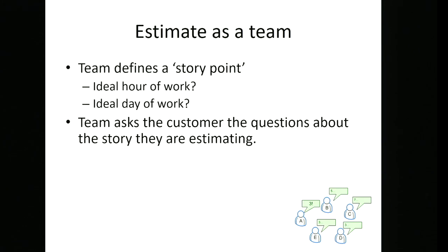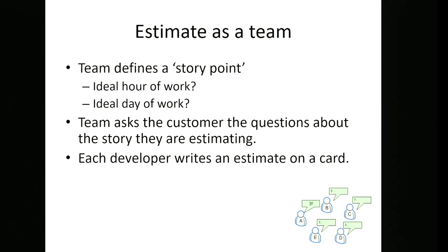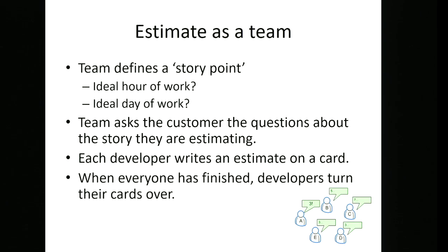You ask the customer any questions about the story they're estimating. So I had a couple of questions before, so this is very sensible. Then, by yourselves, you each write an estimate on a card. And then when everyone's finished, you turn your cards over. And the key thing here is you have to justify your estimates. So you don't start discussing straight away, but you justify your estimates to the rest of the team.